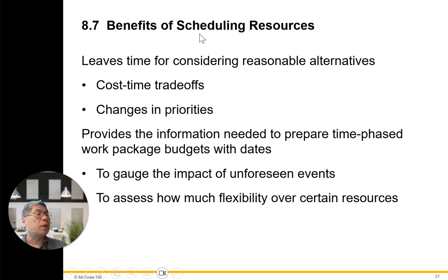Benefits of scheduling resources: they leave time for considering additional alternatives such as cost-time trade-offs and changes in priorities, provide the information needed to prepare time-phased work package budgets with dates, gauge the impact of unforeseen events, as well as assess how much flexibility there is over certain resources.